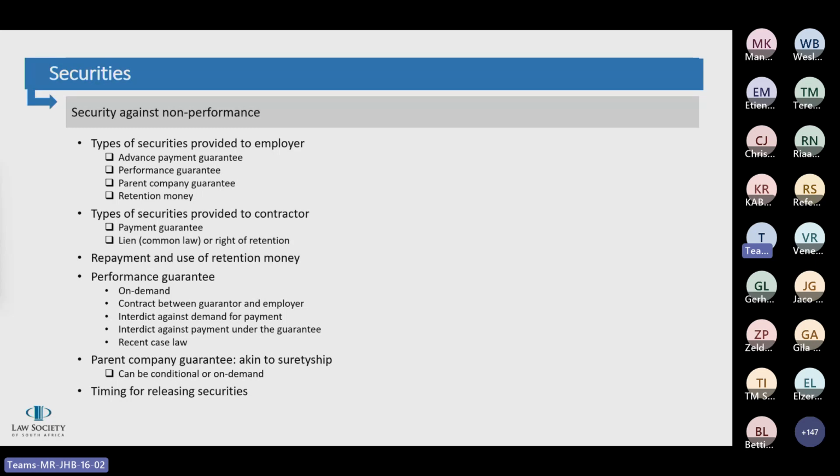The court looked at this and found that the contractor did not demonstrate that the employer would clearly and unequivocally breach a term of the underlying contract by calling on the performance bond. And it found that the contractor cannot rely on implied terms of the contract to try and prove the underlying contract exception is part of our law.